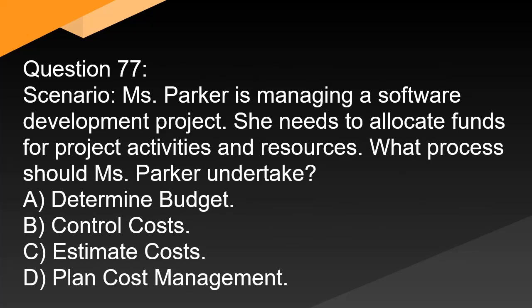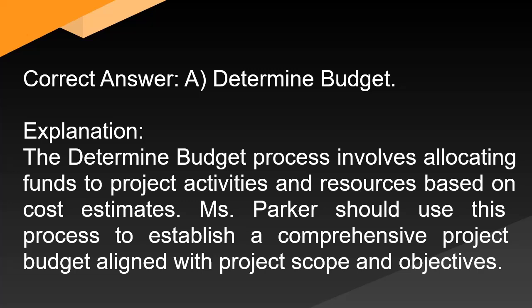Question 77: Ms. Parker is managing a software development project. She needs to allocate funds for project activities and resources. What process should Ms. Parker undertake? A. Determine budget. B. Control costs. C. Estimate costs. D. Plan cost management. Correct answer: A. Determine budget. Explanation: The determine budget process involves allocating funds to project activities and resources based on cost estimates. Ms. Parker should use this process to establish a comprehensive project budget aligned with project scope and objectives.